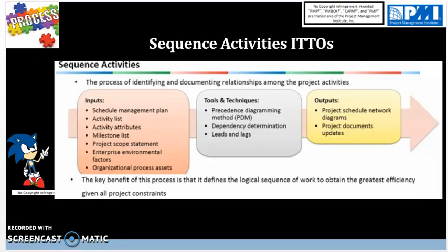Remember, it consists of the risks, assumptions, constraints, and major deliverables, what we're trying to deliver for this project. EEFs, factors that are not in the control of the project team but influence and constrain or direct a project. OPAs, formal, informal, internal policies and procedures, lessons learned, and how to sequence the activities based on previous project experience. And also this could include schedule network diagram templates.